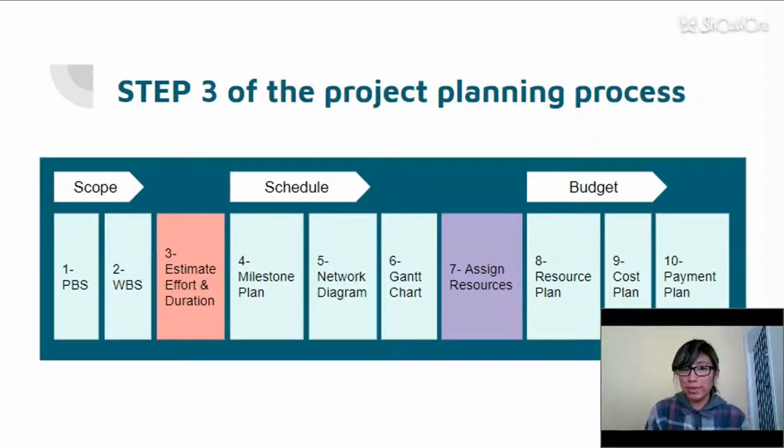Information like who will be responsible for each work package, what is the work package specification, what are the expected results of each work package, how is the achievement of the results measured, what are the prerequisites for the work package, what are the conditions under which the work has to be done, what are the required start and end times, what and how much material is needed for each work package and at what cost, what tools are needed for each work package at what rate, and all that kind of information.